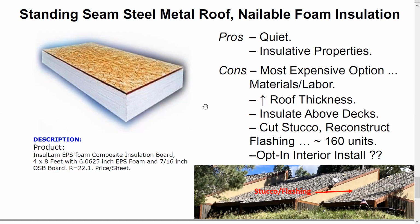Right. Now, if you insulate between the heat coming from and you insulate that, then there's a chance snow could accumulate and then you start worrying about load. And you certainly wouldn't want your roof to fail because you have some insulation. Greg, you probably know more about that than we do. That's the beauty of the standing seam. It's gonna shed. I don't care how much insulation you have, it's gonna slide, whether it's cold roof or warm roof.